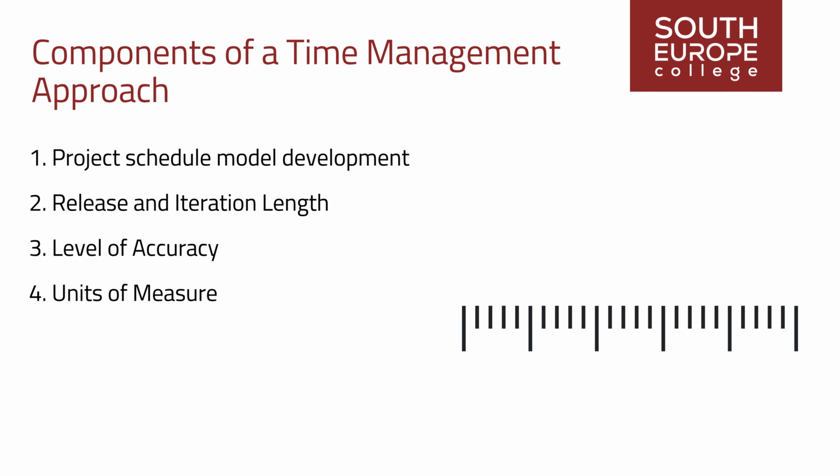4. Units of measure. Definition of units of measurement for various resources, such as staff hours, staff days, or weeks for activity time measures, and meters, liters, tons, kilometers, or cubic yards for quantity measures. This ensures consistency in resource allocation and tracking.